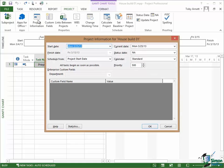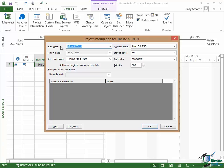Now right at the top we have a project start date and as you saw in the previous section, by default, our tasks are being scheduled to start on the project start date. Now effectively because I decided that I want to set this project a little bit in the past, I need to change the start date and you can always change the start date by going into Project Information and setting the start date here.